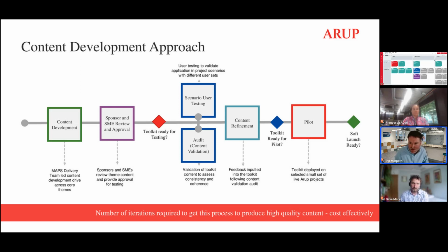I think probably the other thing, Dave, which I thought was really good, was the scenario testing. Giving people a problem and asking them to go and solve it with the MAPS toolkit, and evaluating how that experience was: could they find it within the toolkit quickly, and also, reading the content, did they have the confidence to go and give it a go? I thought that gave us the confidence that we were close and ready to deploy the toolkit.